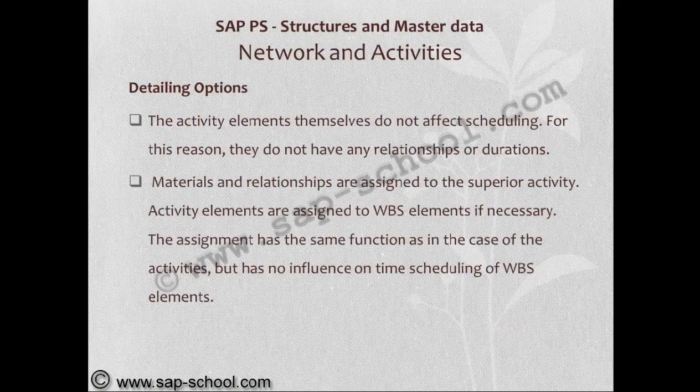The activity elements themselves do not affect scheduling. For this reason, they do not have any relationships or durations. Materials and relationships are assigned to the superior activity. Activity elements are assigned to WBS elements if necessary. The assignment has the same function as in the case of the activities, but has no influence on time scheduling of WBS elements.